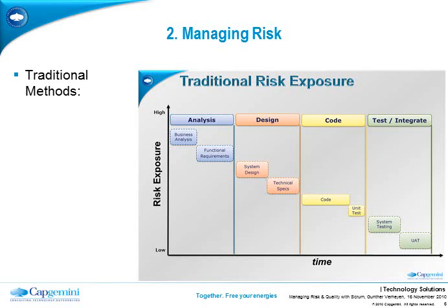Now, what happens if you apply this model to a project or product development? You've got one large sort of big bang build during the test and integration phase somewhere. And up to that point, the risk will only pile up. You build up risk because you only create stuff on paper, you write code, but you don't get too much feedback. You get sign-offs, you get agreements by people, but that's it. So risk essentially builds up.